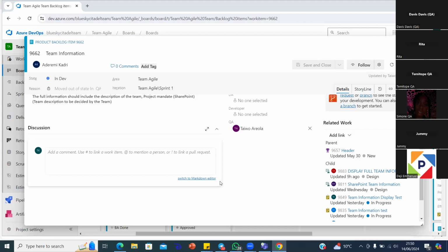Some other people have used another approach as well, which is basically the one I just mentioned, where the bug and the story or the PBI have the same life cycle, which means that the bug will block the story from moving forward.